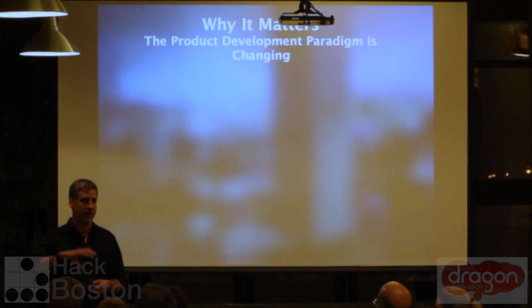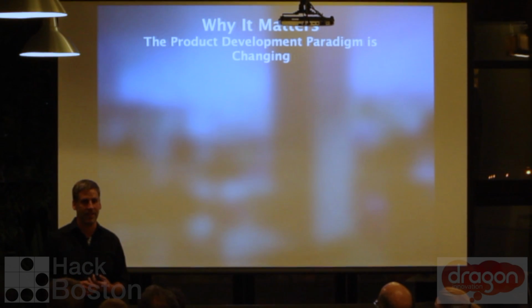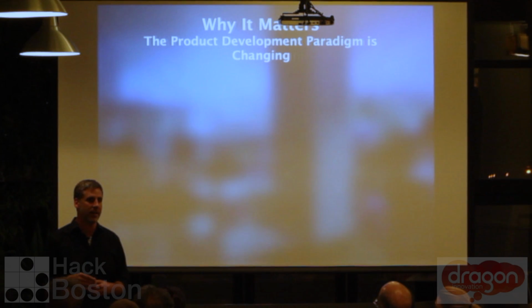With a good manufacturing service agreement, you can try to anticipate these things and lay it out ahead of time, so you can use that as a guideline for what happens. So in the case of a catastrophic failure, like 100% of them fail, then that should be covered. Usually we say if more than 3% of them fail, the factory has to absorb the complete cost for fixing it if it's a manufacturing defect. But yeah, step one, get the data and understand it. And then there are good strategies like the 8-step plan to be able to correct it.